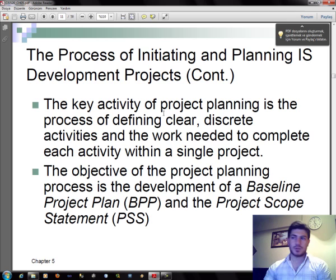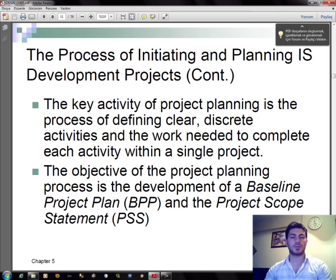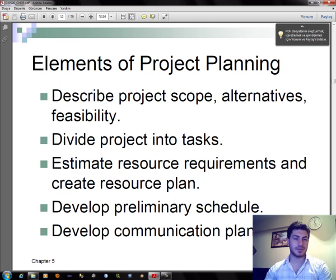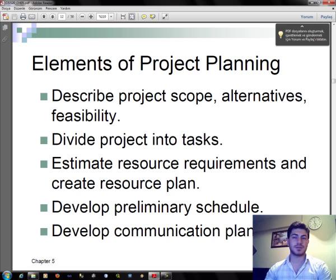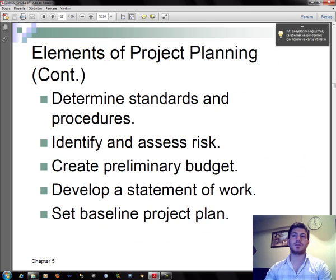The key activity of project planning is the process of defining clear, discrete activities and the work needed to complete each activity within a single project. The objective of the project planning process is the development of a baseline project plan and the project scope statement. Elements of project planning include: describe project scope, alternatives, and feasibility; divide project into tasks; estimate resource requirements and create resource plan; develop preliminary schedule; develop communication plan; determine standards and procedures; identify and assess risk; create preliminary budget; develop a statement of work; and set baseline project plan.